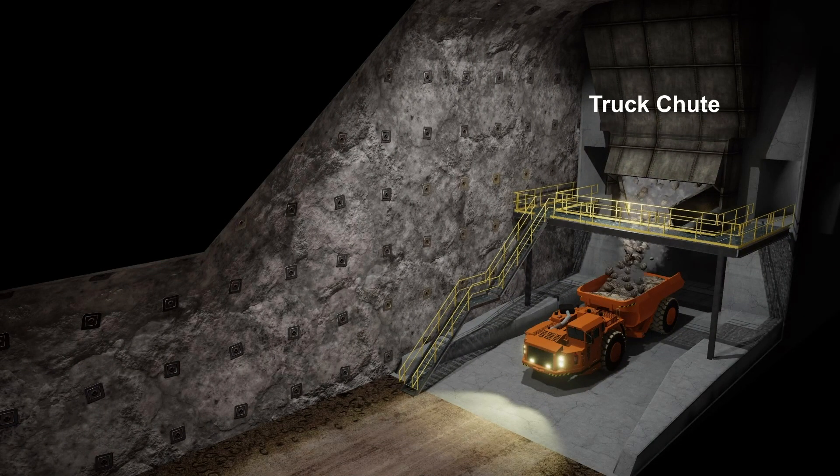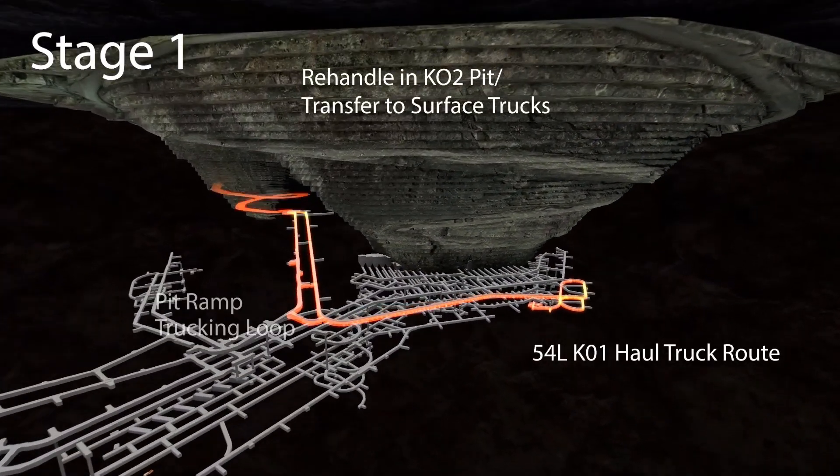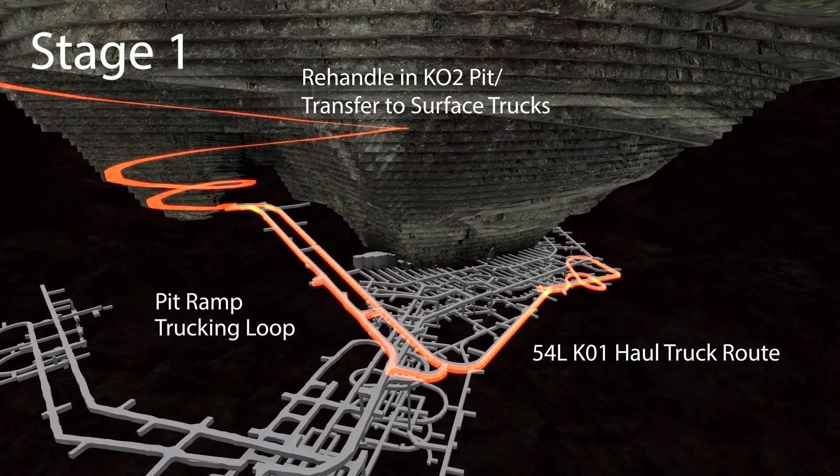The ore handling system matures over three stages. Stage 1: A temporary pit ramp before the production shaft is commissioned and before K02 ore body commences. Deferring the K02 ore body ensures the integrity of the pit ramp.